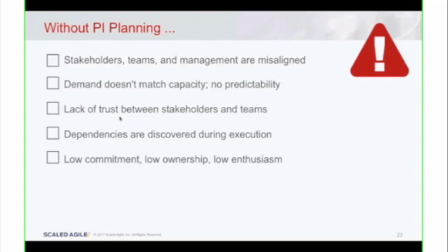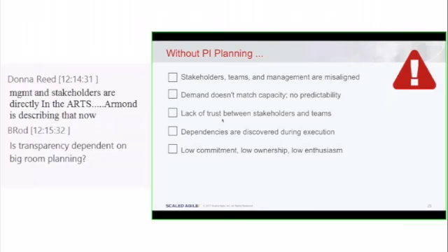But the truth is that you save all kinds of time by doing this 2 days of planning up front, because by doing this level of planning all concentrated in 2 days, and everybody you need is within line of sight, you avoid the need for dozens and dozens of meetings that are really hard to plan, because you need to have a quorum in these meetings, and everybody's on different vacation plans.